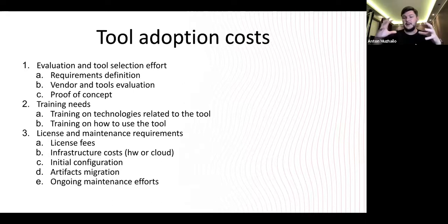So in this case, we need to compare the investment and the return on investment. So we see what benefit we can make. And which is interesting, we should take into account the duration of a project, because, well, if it takes say 10 months to come to the zero point, we'll get the benefit and only partial benefit from the last 2 months, and it probably won't be worth this improvement, because we can eventually miss in some estimation, and we can even lose. So that's why some projects do not need to be covered with automation, because they can be tested cheaper manually. Well, and that's another reason, answering the question, why do we need manual testing? Because it's cheaper and faster.